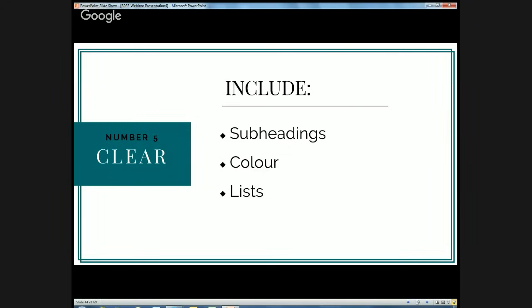In the weekly report template that I use, there is a box for Progress this week. In that, I use a subheading, which is the name of the major work stream in the project, one that everyone's very interested in right now. Then I use a bulleted list of what was achieved just on that work stream underneath that subheading. Then another subheading for other progress, and that covers all the other tasks, all the other workstream activity in another bulleted list.